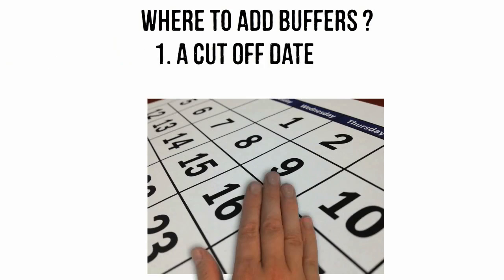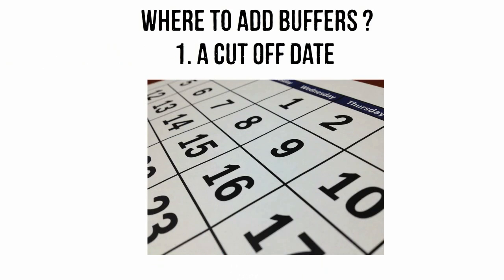1. A cutoff date within the sprint by which development must finish, to make sure that Quality Assurance (QA) have time to finish their work.